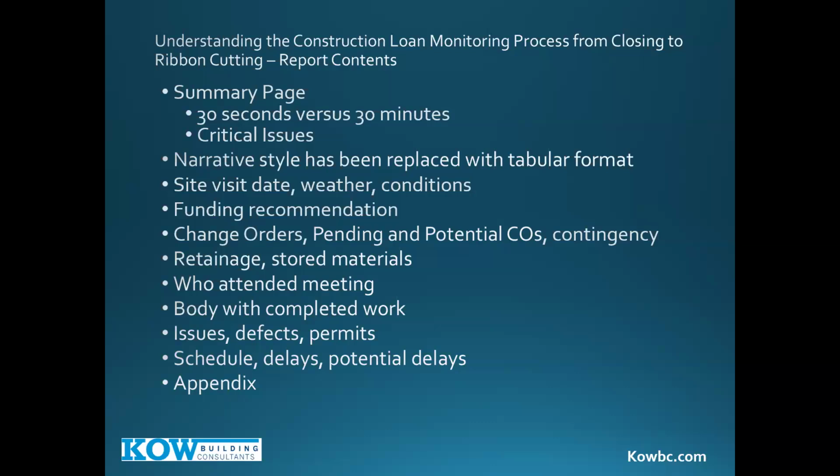And most of our readers, most of our clients, many of them, they're very busy, they have big portfolios, and they unfortunately don't have the luxury of going out in the field to see the construction site. So we really need to make it as clear and concise as possible. We tell you when we went, weather conditions, which again, that may impact the schedule. If you're going to call us and say, hey, why didn't they pour the second slab for concrete, and we see it's 8 below, or it's freezing or it's raining. Okay, now we know. So the weather and conditions are key.